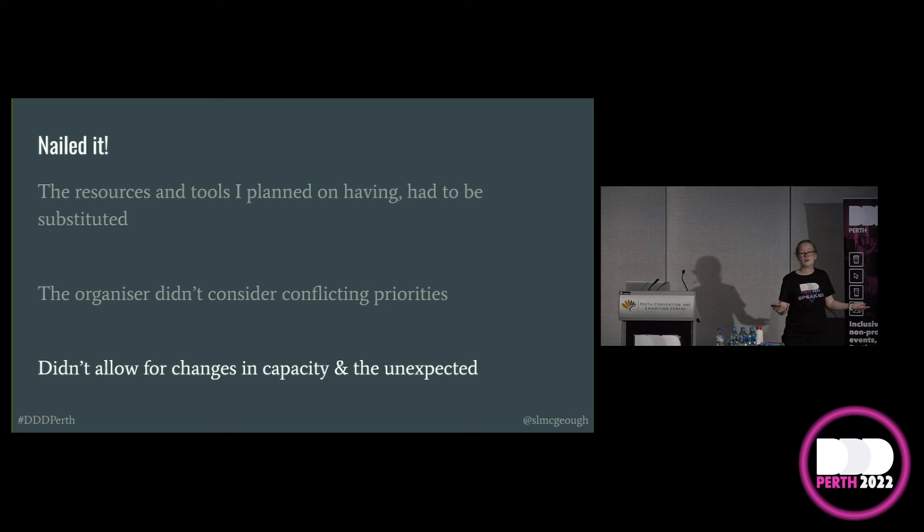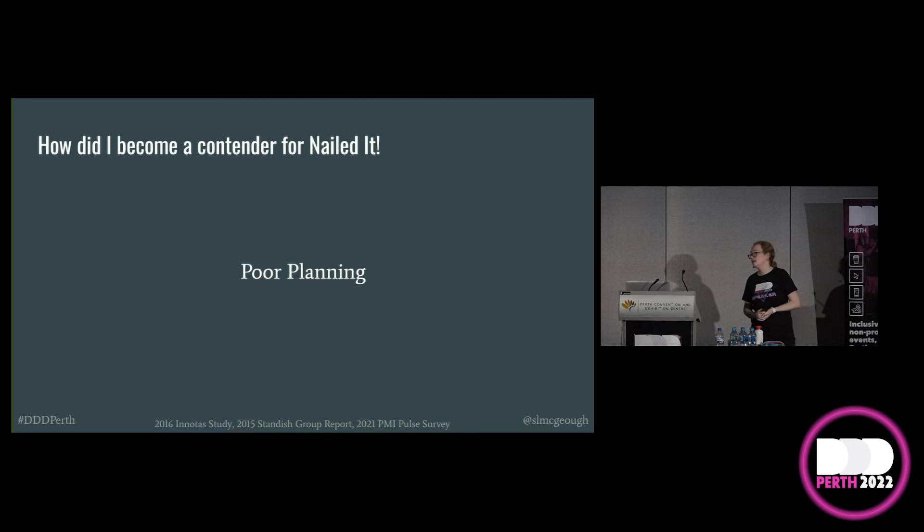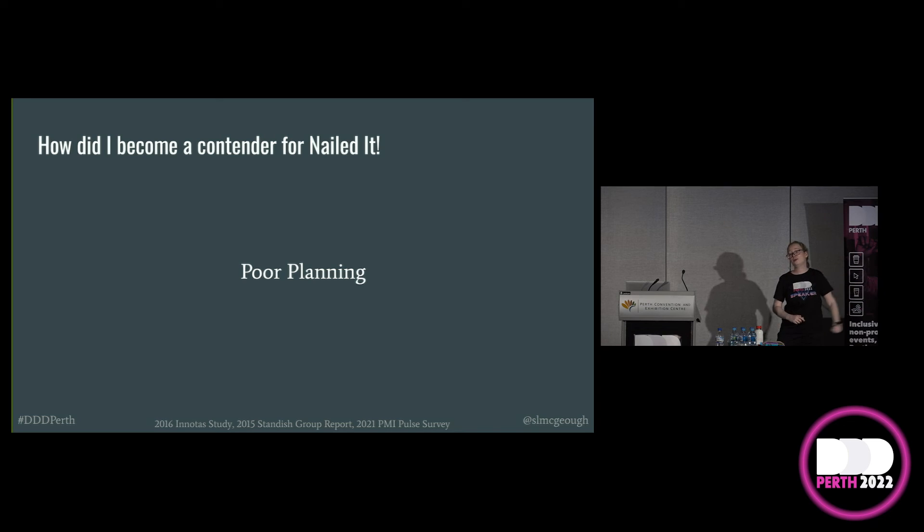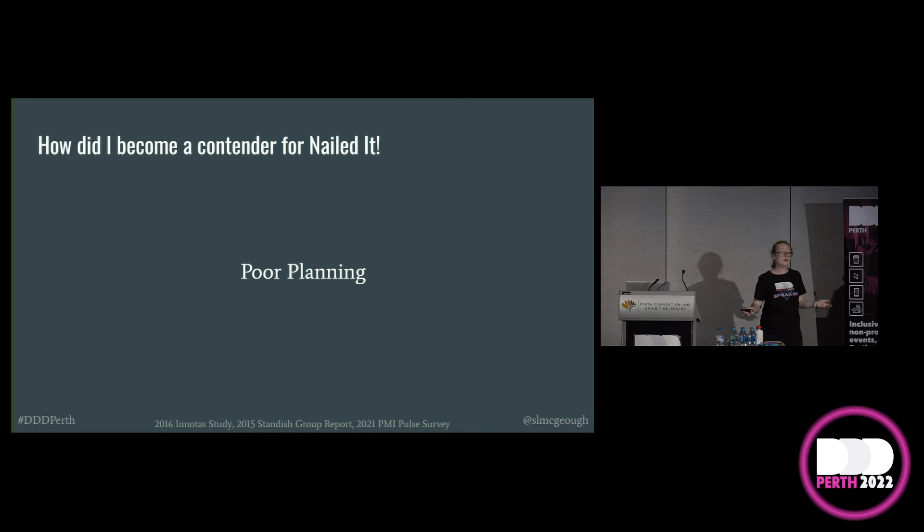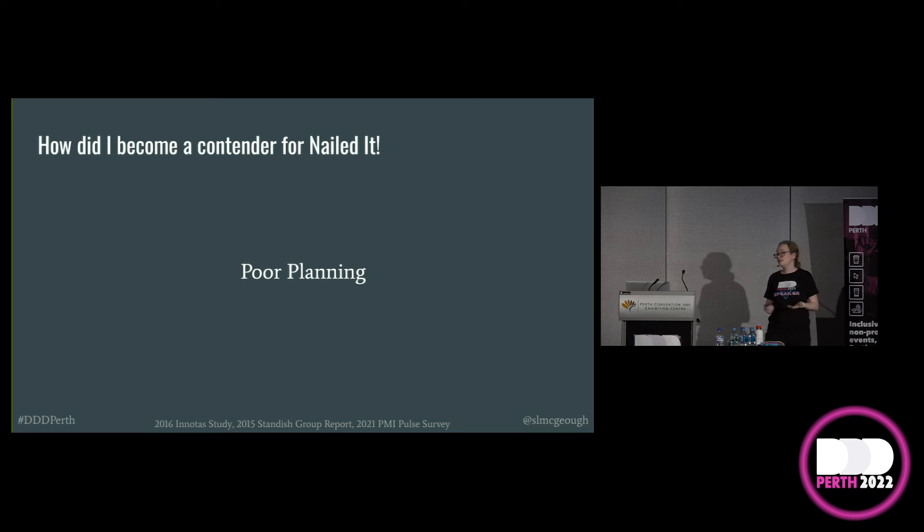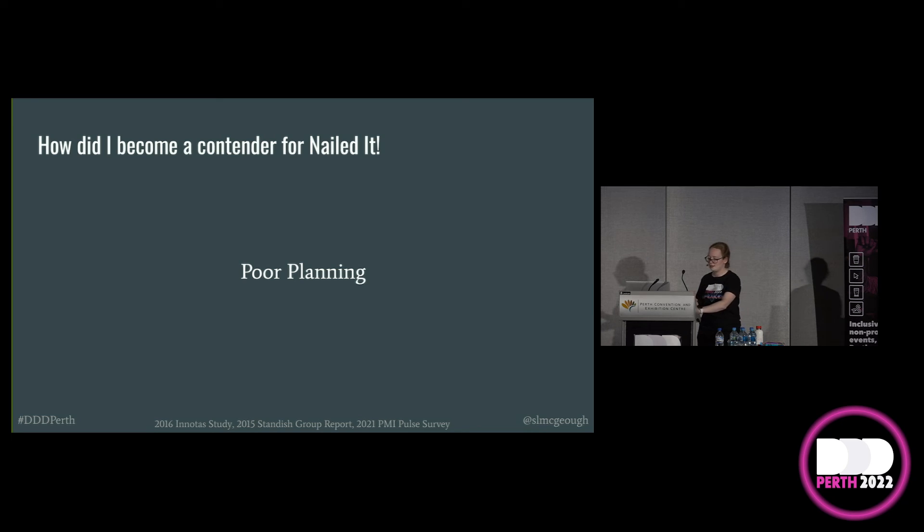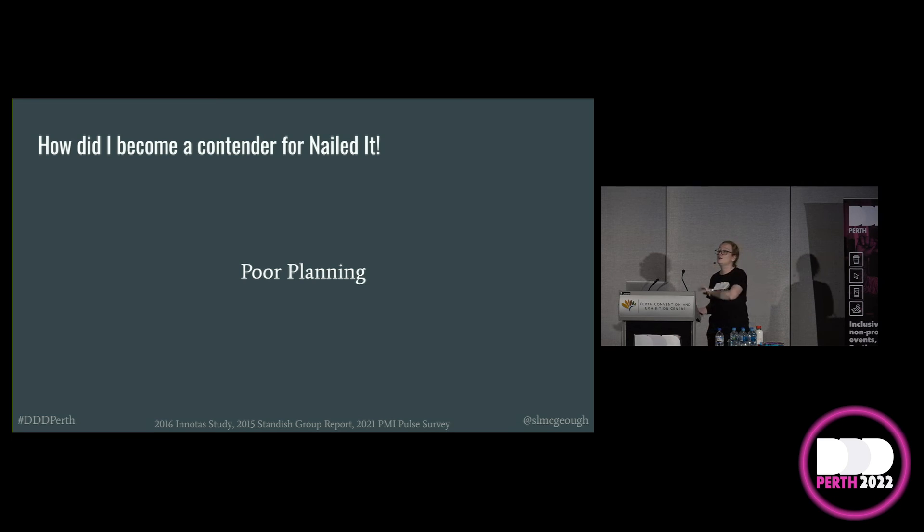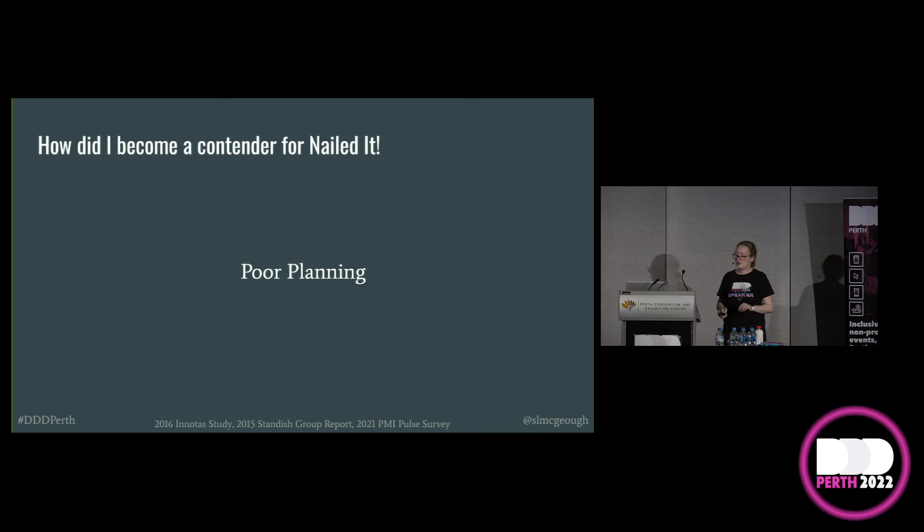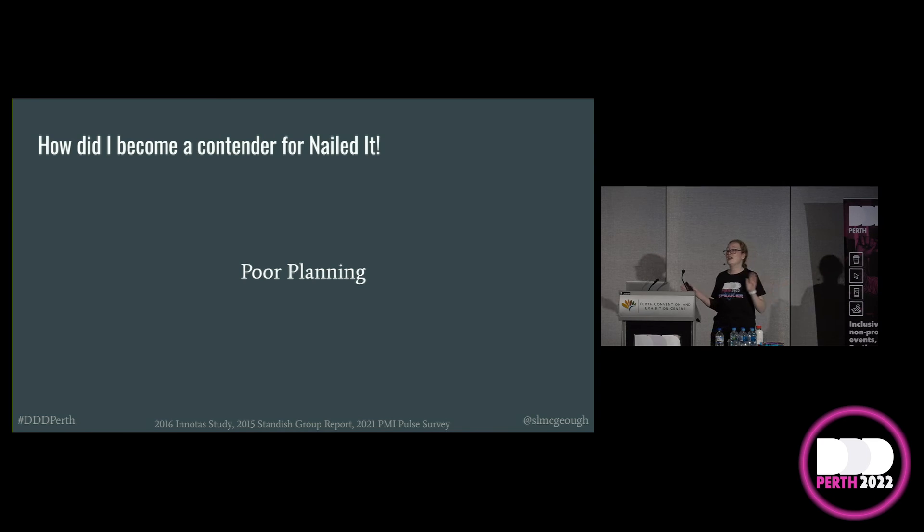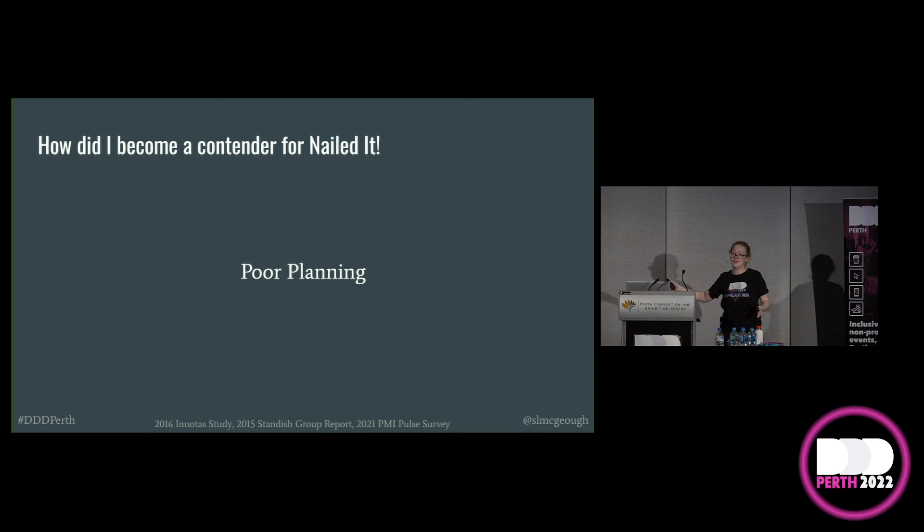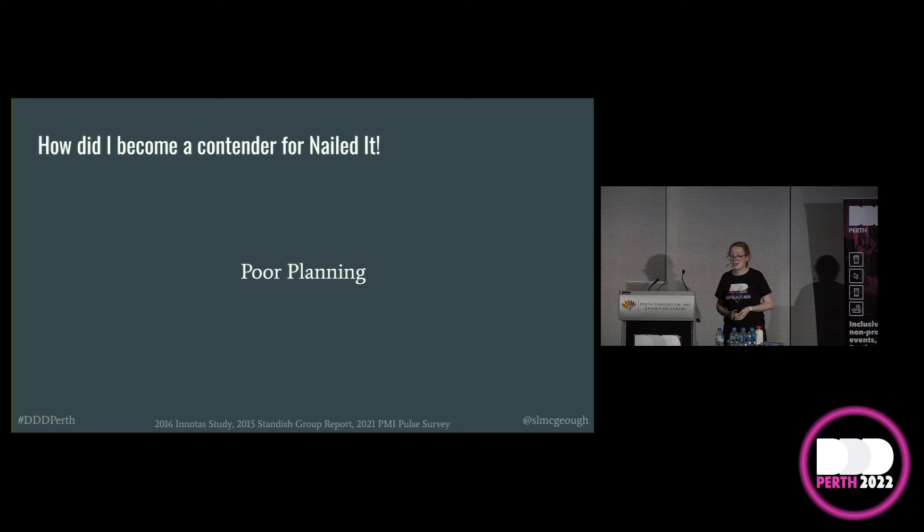At the end, it just came down to poor planning. Now, this is a contributor to 71% of projects that fail so it's a big one. And look, it's not just related to baking or anything else like that. Poor planning caused a three-time cost overrun for the U.S. national gas company's ERP update. So they originally budgeted $330 million and it cost them just over a billion to finish that project. That's a lot of money. Could have been spent elsewhere.